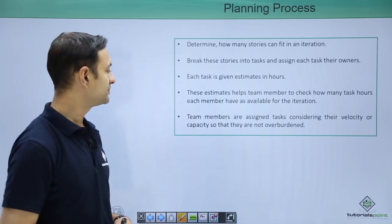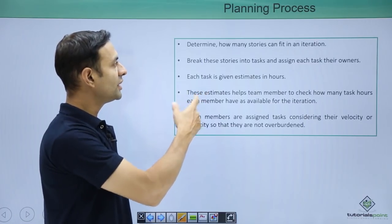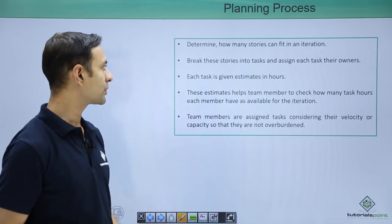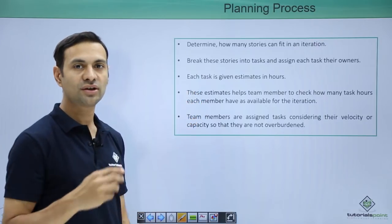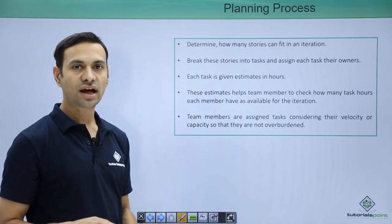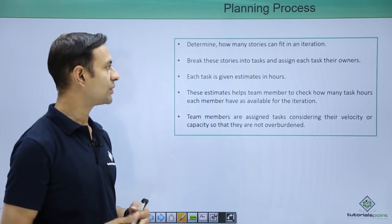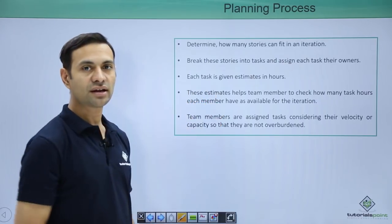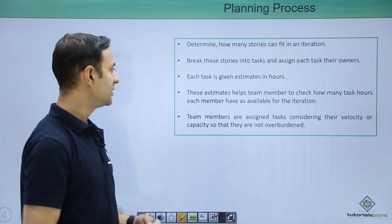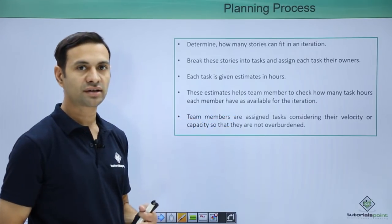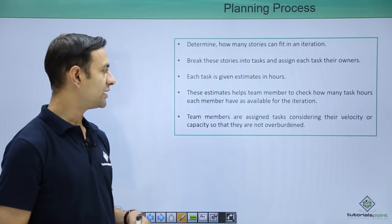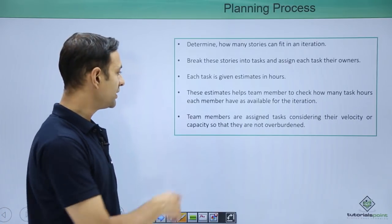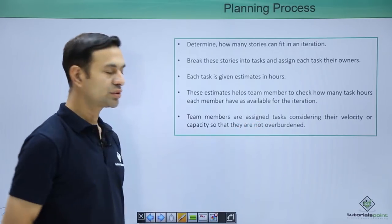The planning process: first, determine how many user stories can fit in an iteration — maybe 4, 5, or more. Then break these user stories into tasks, which are the actual work to be done by developers or testers, and assign each task to their owners. Each task is given estimates in hours — 8 hours, 10 hours each — to help team members ascertain how much time is required and confirm they can fulfill their commitments. Team members assign tasks considering their velocity so they are not overloaded.